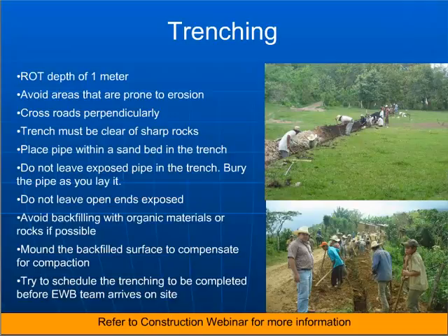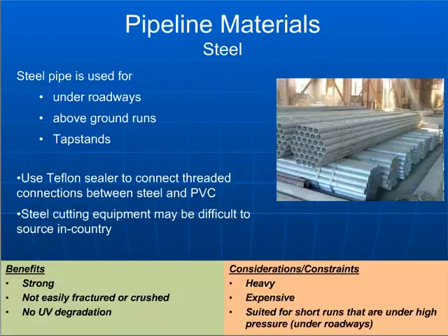So that's another good thing to talk with your community about as you're trying to schedule the construction of these systems: trying to figure out when would be the most appropriate time to engage in these large trenching operations. There are a few more points on the left there that you can take a look at as well.